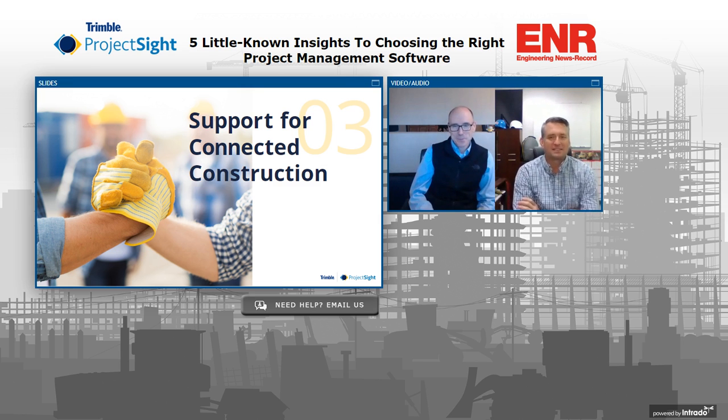So the idea that daily reports shouldn't be a person, right? Daily reports should be multiple people, multiple sources, because not one person knows everything that's taking place on the job site. So four different people should be able to take a picture of that day and post it as part of the daily reports to document what was taking place. I mean, I have seen job sites, like you mentioned on the weather. The rainstorm came through, but it really only hit the east side of the job site, and it dumped a quarter inch of rain there and nothing on the other side. And so one half has pictures of muddy footings and the other is fine.